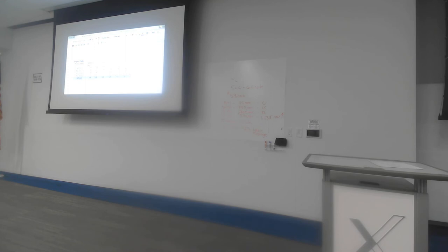Which of those two options should I choose? Well, this is where the costs come in, and this is where it's useful to actually put in costs in all my calculations. Because out of those two options, as a project manager, I want to do the one that is best for me or most beneficial to me financially. And so if I look at crashing J will cost €8, crashing B and E together will cost the combination of those two crashed costs, so 4 plus 5 is 9. So crashing B and E will cost me €9 to do it per day, but crashing J will only cost me 8. So the best option is to crash J by one day, and I can see that that's all I have with it. I can only crash it by one day.